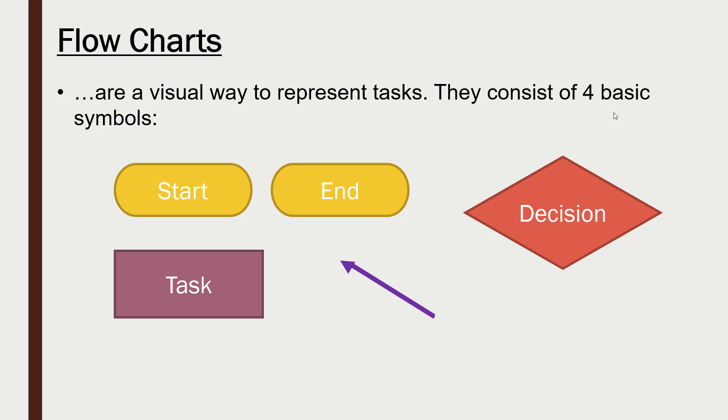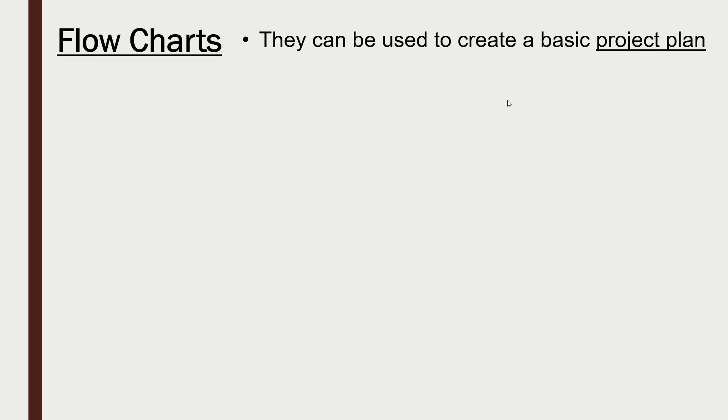So let's see how they can be used. They can be used to create usually quite a basic project plan. For example, start always starts off a flowchart, so we have one arrow coming out of start. And let's say our first task is going to be to bore the tunnel, actually drilling out the tunnel from under London if we're making Crossrail. So we're boring out the tunnel, drilling through. That's our first task.